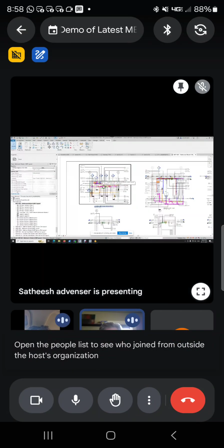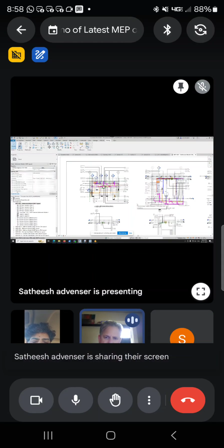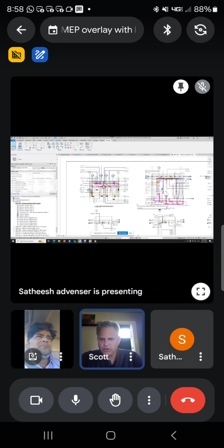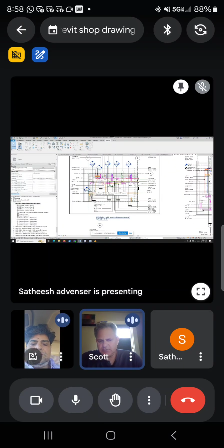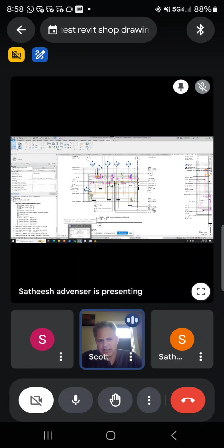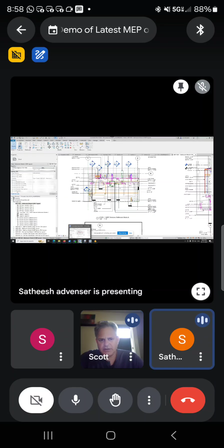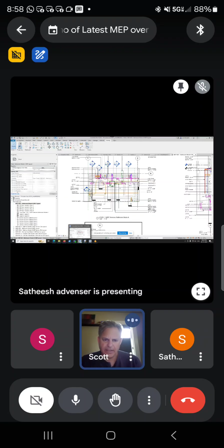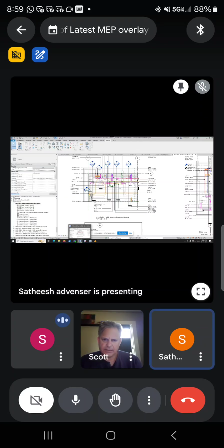This looks really sharp. Now, what I'm also thinking about is, is it possible to take just the plumbing portion of it and break it up into a parts list so I can have a guy go, hey, I need 20 elbows, 90 degrees, 3-inch. I need 3-inch pieces. I have two 24-inch pieces. I have one 13.5-inch piece. Which means you need quantity. Yes. Kind of like a bill of material, right, Scott?